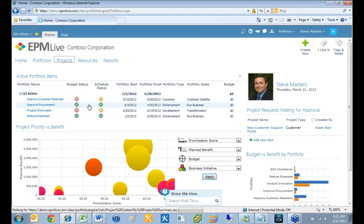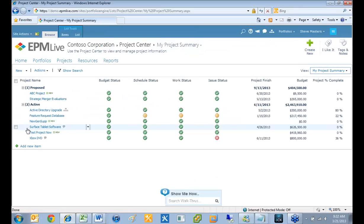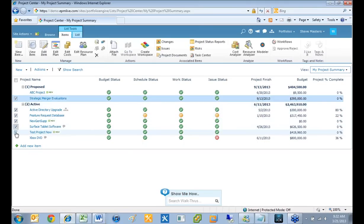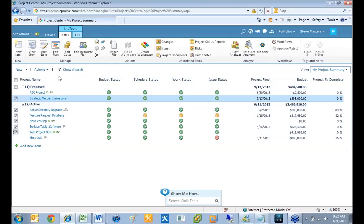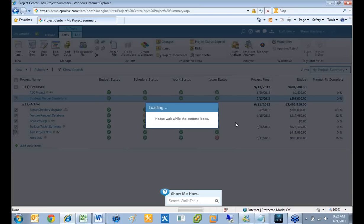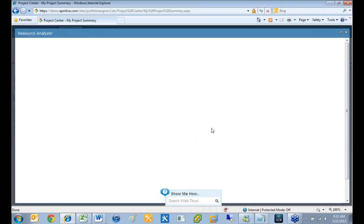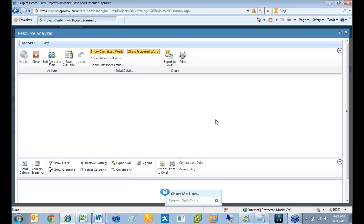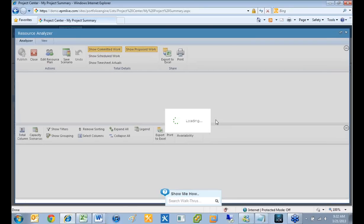I'm going to go back into projects. With these tools, I can select more than one project — all of these proposed projects. I have a set of proposed projects and can start doing analysis and modeling with them. I'm going to open up the resource analyzer. What it does is open up all of those selected projects and allow me to do analysis and what-if scenarios around resourcing. Maybe we have problems — I need a person on multiple projects but they just don't have time. We need to figure out how to resolve that, or make the choice that we're not going to do all of these projects.